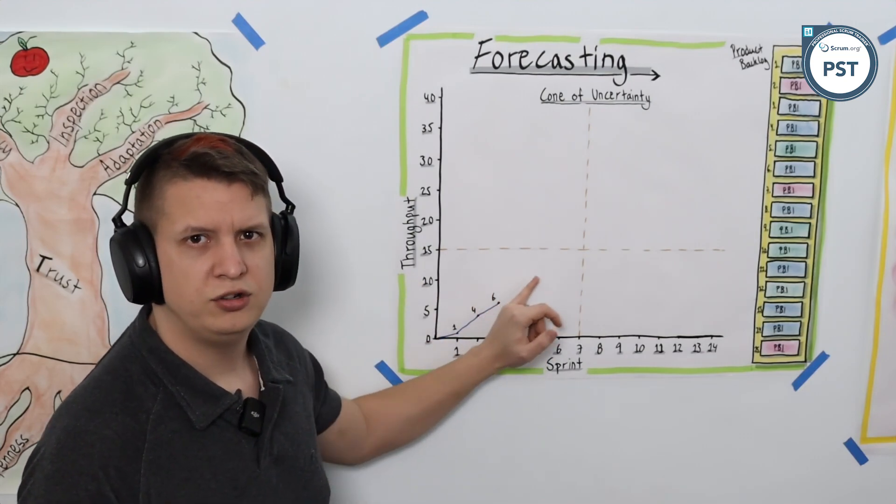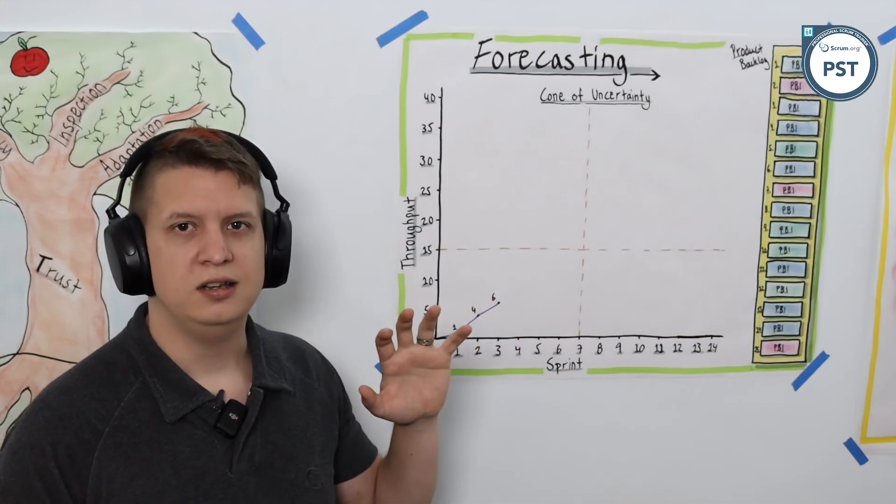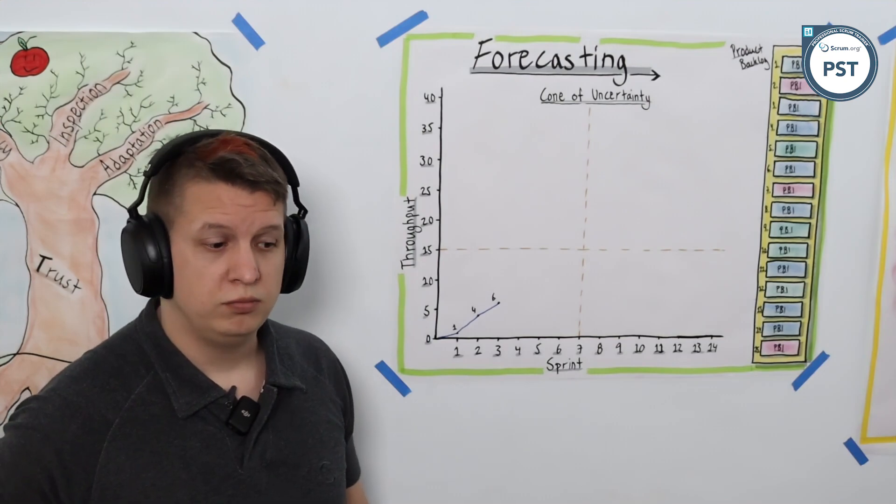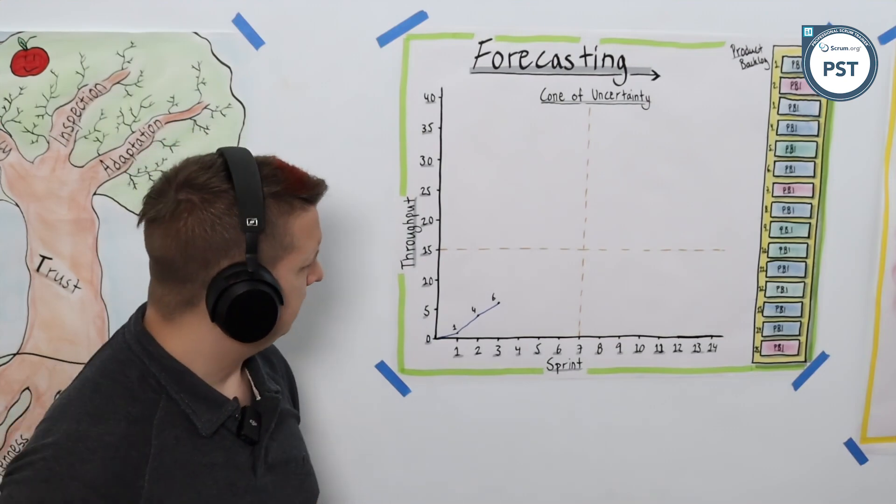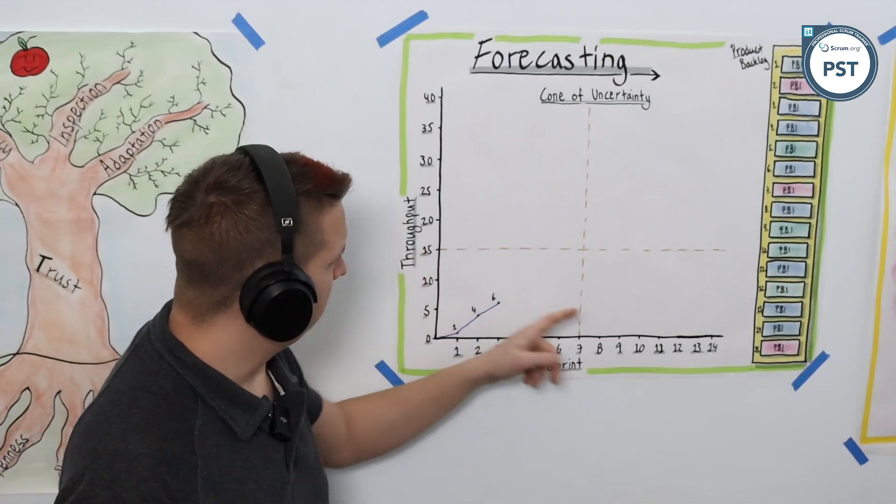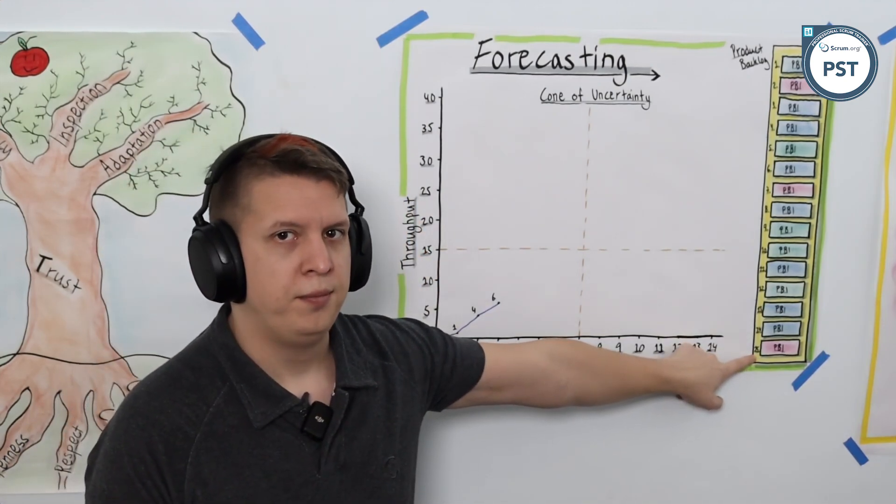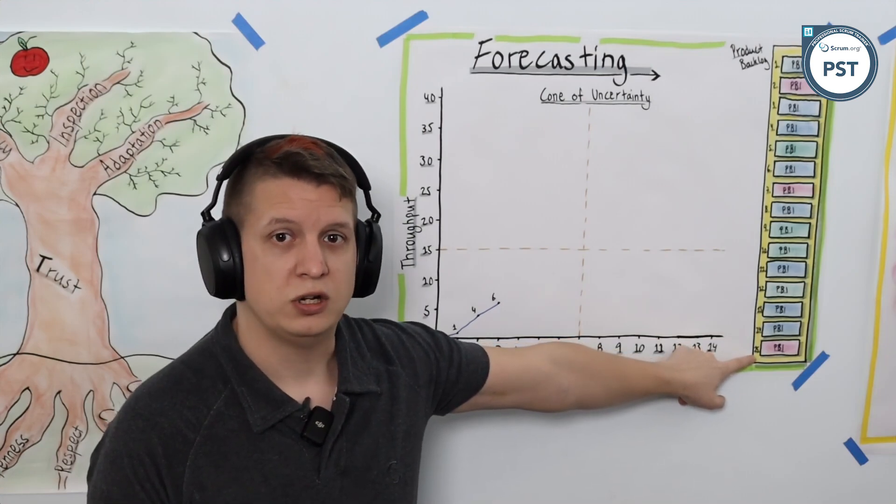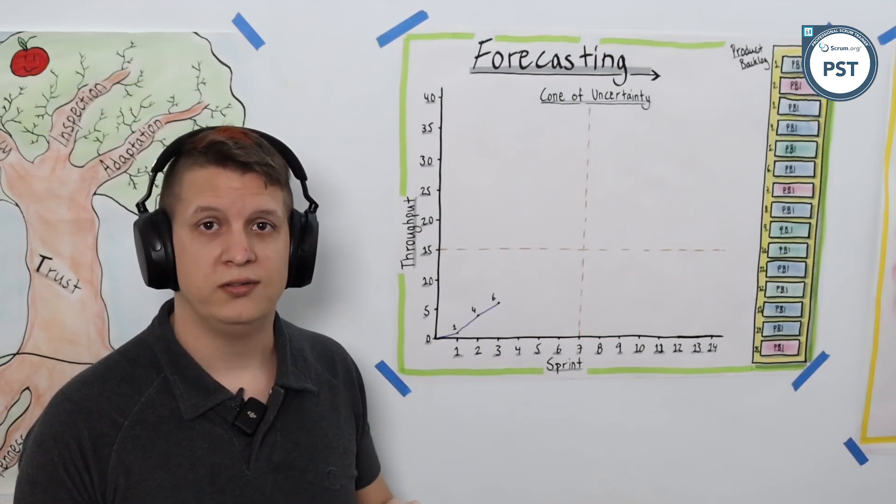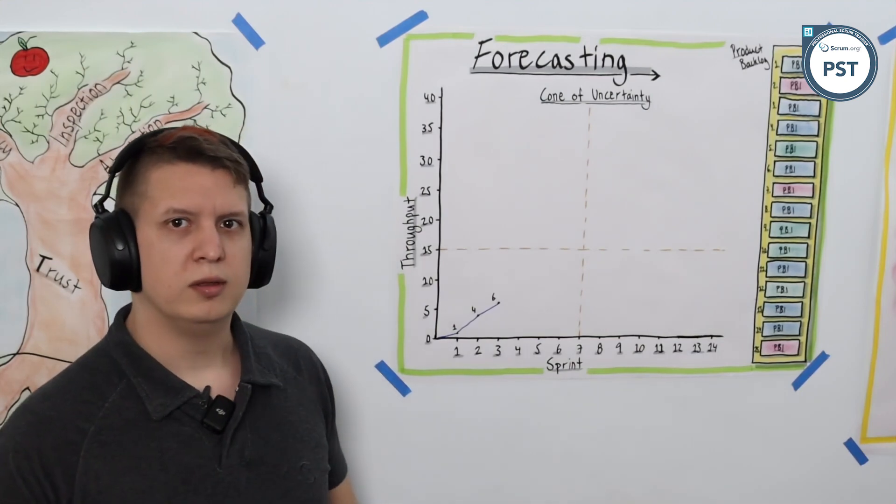That means our worst case was one, best case was three, and our average with those three points of data is two. Now we can look ahead into the future. When our stakeholder asks, okay, well how much stuff can you get done by sprint 7, or maybe they ask when can you get all 15 done by, we can try and answer that question by using that data and looking ahead with a cone of uncertainty.